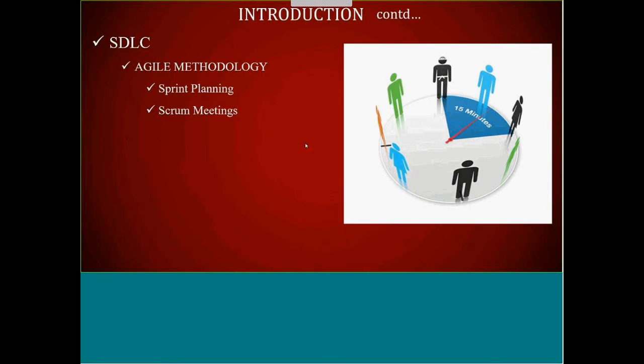Being a tester, say suppose tester: yesterday I went through the requirement documents and I was able to understand how exactly the login module works. So today I have started writing the test cases for the login module. Today I have completed around 10 test cases, and I have around 50 test cases. So tomorrow I will complete those remaining test cases, and my test plan will be ready. So he has covered what he did yesterday, what he is doing today, and what he will do tomorrow. And also the same with the developers or UI as well.